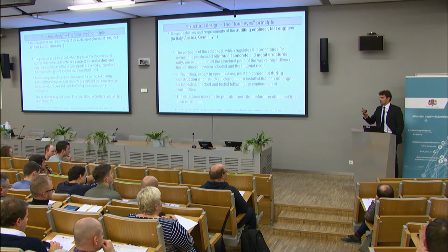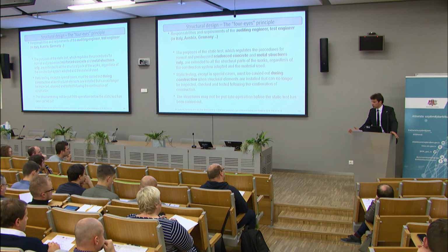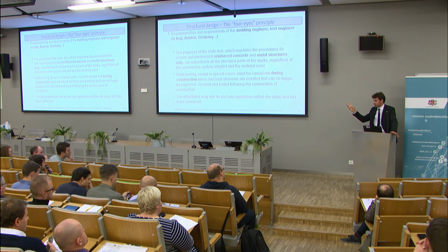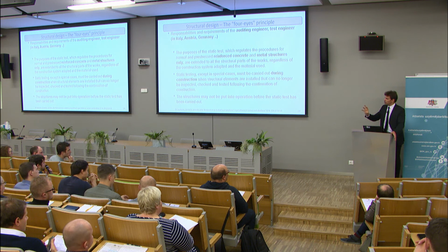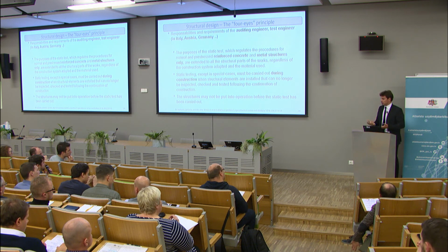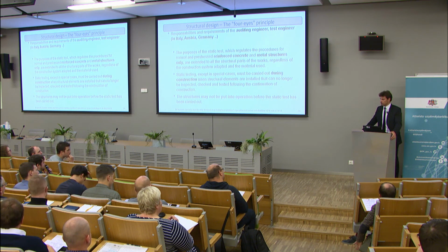He goes there once. Just to make sure it's clear: this external reviewer doesn't go every day to the site during construction. Usually, this reviewer came to Linz, I think, 5 times until now, but just because it is a very important project. Usually they come when the structure is built, and they check that everything was built according to the plans and properly executed.